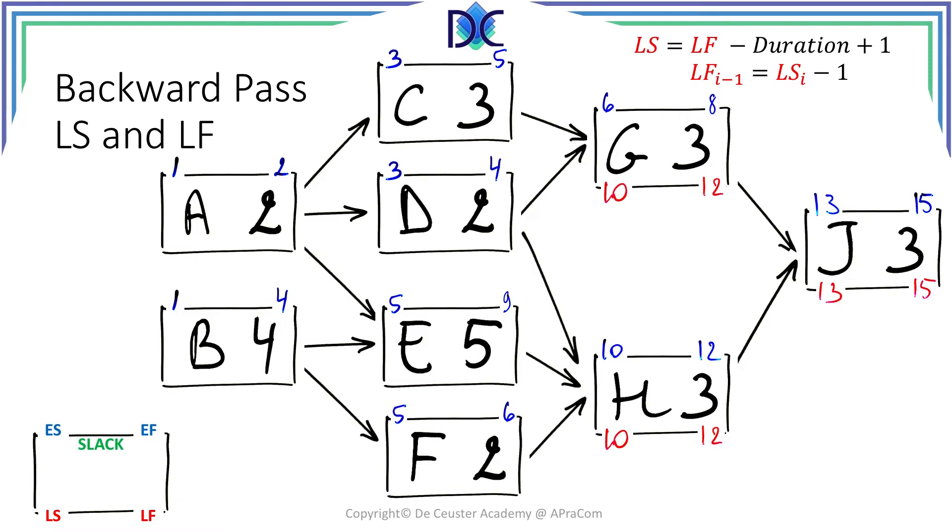Now let's have a look at the predecessors of activity G. We have C and D but D has also the predecessor H. So first C. C cannot finish later than April the 9th. We have 10 minus 1 is 9. That's the second formula. If activity C would start later than April the 9th, activity G cannot start on the 10th and so on. The project will be late.